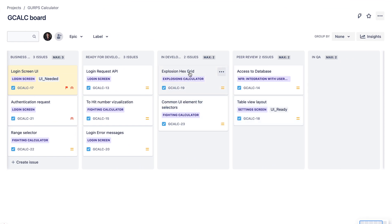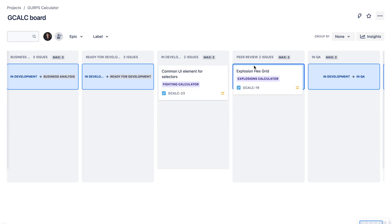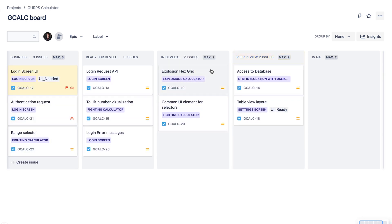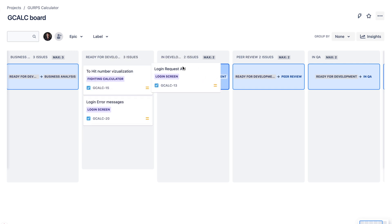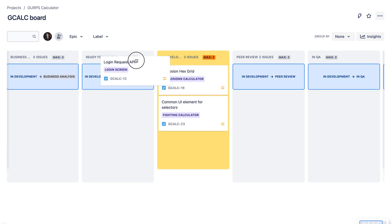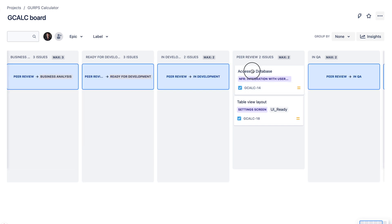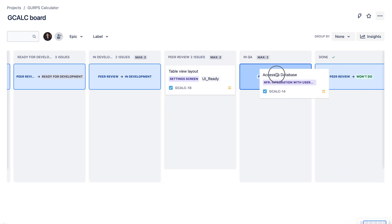We'll reach a situation where we have two tasks in the in-progress and two tasks in the peer review columns. Now the system starts to self-regulate based on the work-in-progress limits. For example, a developer finishes a task in the in-progress column but cannot move it to peer review because we're at the WIP limit. He also cannot take a new task from to-do because that's also at the WIP limit. Instead, this developer has to take a task from the peer review column, perform the review, and push it to the in-QA column. As you can see, it forces people to get things done.